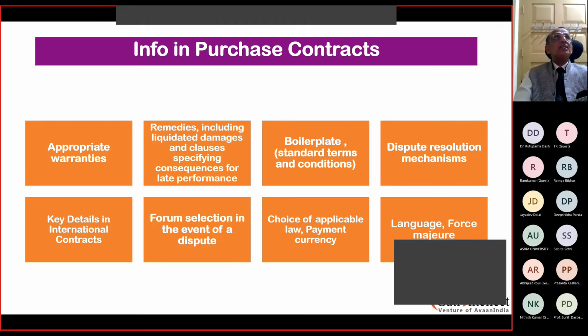So you will say ETA, estimated time of arrival, or ETS, estimated time of sailing from Paris or Germany, wherever it is. You do not commit any delivery time. If you commit, then you become liable. So please understand, you will only say estimated time of arrival.